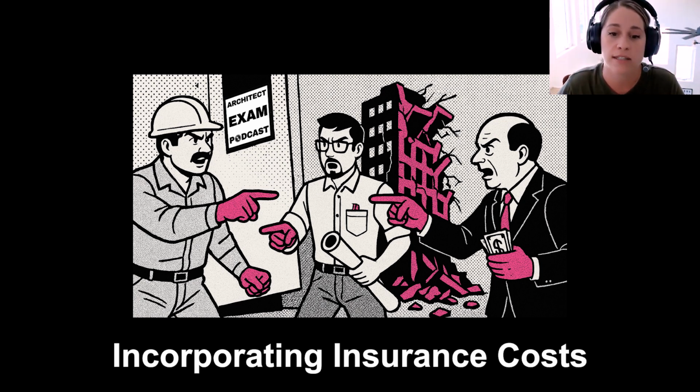Professional liability might cost anywhere from 2 to 5% of your gross revenue. So that is a significant chunk. You don't want to forget to charge for that in your fees and then have to pay all of that without getting yourself fully covered.